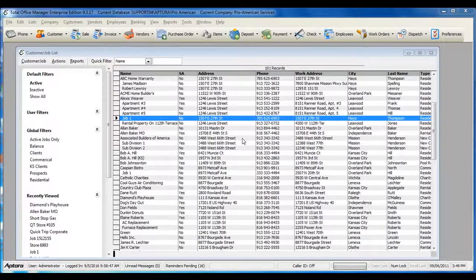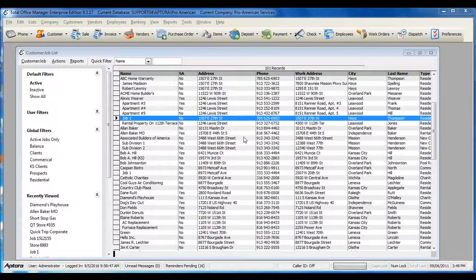When using subjobs in Total Office Manager, you can access job information or job progress by creating a subjob and using the Job Info tab.